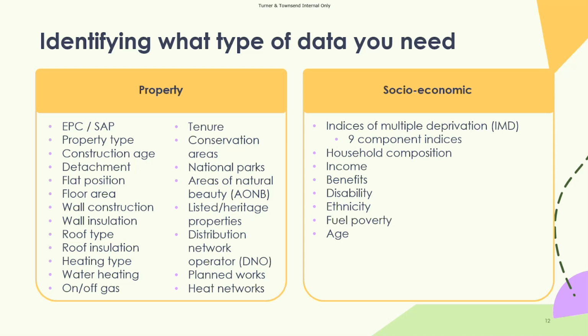This will help you with the prioritization of understanding where is an appropriate place to carry out some of those delivery works. So I might want to prioritize looking at fuel poor areas. There is a specific neighborhood where fuel poverty seems to be a key problem and energy efficiency is not great. So I can start with this, have a look at what homes there are there, what measures are going to be needed, and focus on that area and those residents. So there you've ticked off your area-based approach, your resident-based approach, and your measure-based approach.